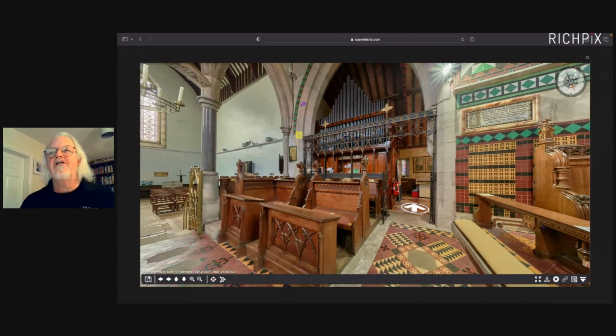There's a number of water authorities, for example, who include this type of image in the tender documentation, because they found out that it does two things. First off, more people will bid for the contract because they don't have to travel to site. But the other thing they've found is it does two things to the price of the tender. It reduces the final cost of the tender by 10 to 15%, because people aren't putting in the leveraging factor, the what-happens-if-something-goes-wrong factor. And the other thing then is they've got more information to make good decisions.